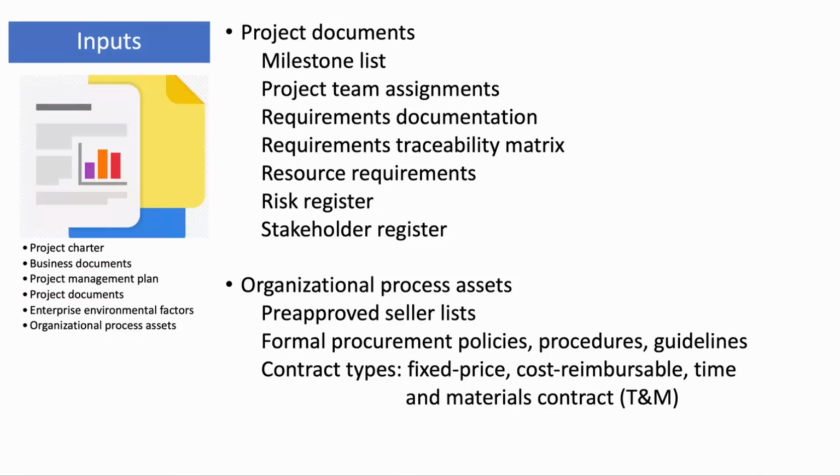The contract types are the contents I want to highlight here. Usually we have three types of contractual relationships. Fixed price contracts are for the condition where no significant changes will happen in the project. Cost reimbursable contracts are for significant changes of work scope during the project. The hybrid way called time and material contracts are for the situation that our statement of work can't be quickly prescribed.